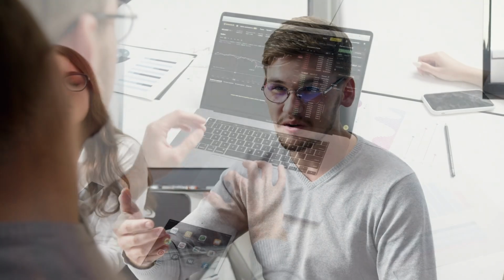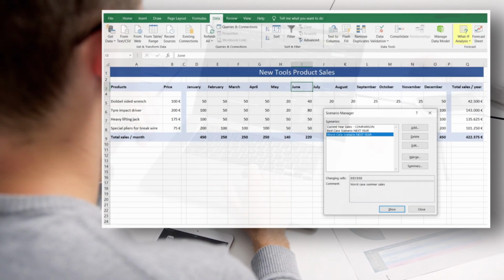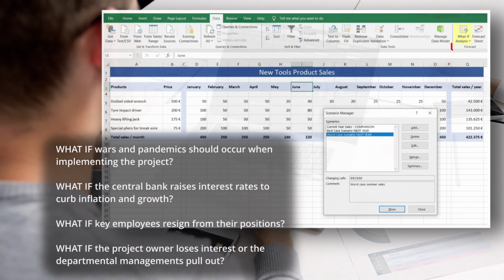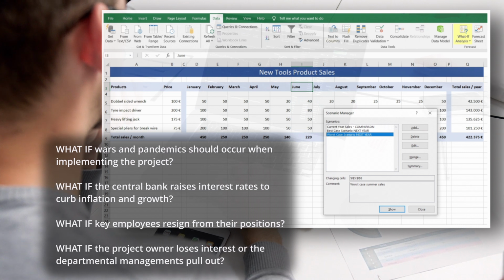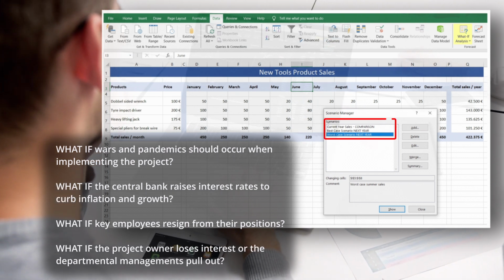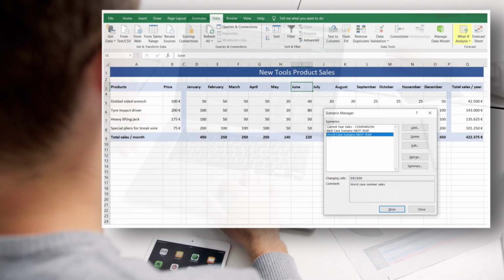In a sensitivity analysis, key factors relevant to the implementation and subsequent operation are selected. The parameters are tested via simulations in different risk scenarios with a so-called what-if analysis. The sensitivity analysis is thus applied to assess the benefit-cost ratio of probable scenarios and to estimate how they might affect the net present value, the payback period, and the break-even time.